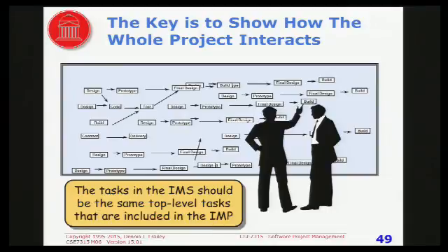And I was at an aircraft company once, at Beechcraft I think it was, and they had something very similar. It was a big wall, about 50 feet wide, and the boxes and the arrows were all magnetic, and they would put everything on magnets on the wall, and then every week they'd update things, and by doing it at this level, they could tell at the project level what was going to happen.